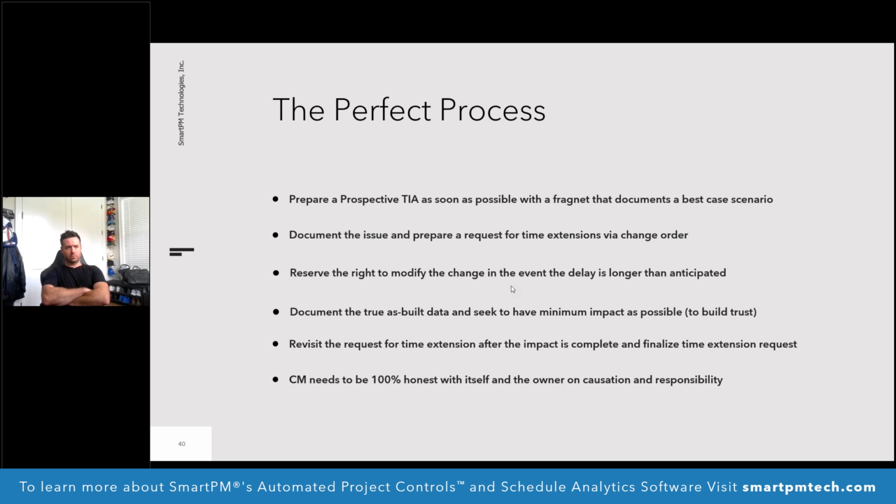You know, in that change order, say, here's what I think is going to happen, and this is the best case scenario, and here's what I'm going to do to mitigate as much as I can down the road. We're going to have a few Saturdays that we work, or we're going to shorten some durations here. We're going to stack a couple trades because I think I can get more resources to recover from this on some of these critical activities down the road. And this is how I'm going to do the minimal exposure, because now you're working for them.